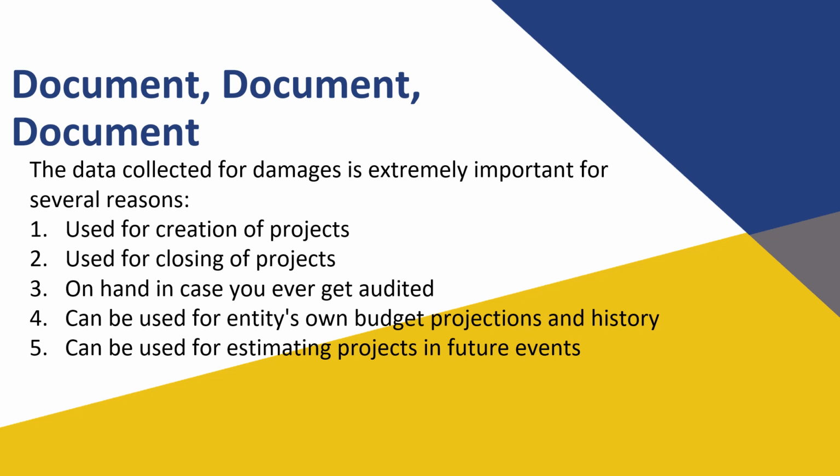Audits might even ask for documents that FEMA didn't require when the project was written, but which may ultimately be necessary to justify the costs. The documentation can also help with your own budget projections or for estimating costs or damages in future events. If something falls outside the scope of work, ask yourself, can I complete the scope of work as written, or do I need to modify it? Be forewarned, expenses incurred outside the scope of work are not eligible for PA reimbursement, so modify the scope of work with approval from HSEMD and FEMA to include the work to be performed whenever necessary.